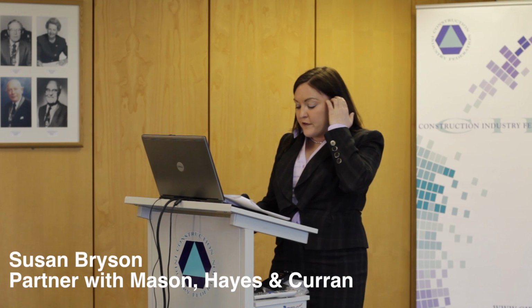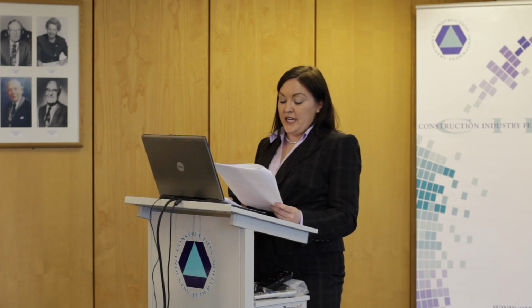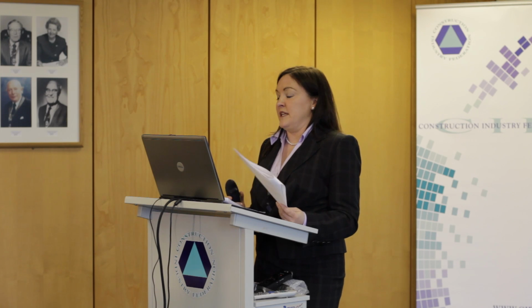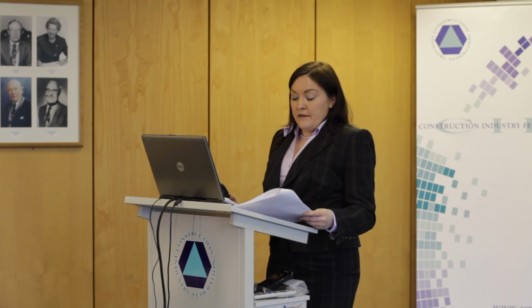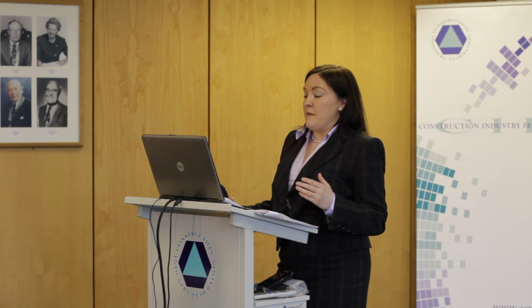Clause 3.4 provides that until the EOR issues the defect certificate, so any time before defect certificate, if the EOR gives the contractor a written instruction in relation to the works, the contractor must implement the instruction. This can include an instruction changing the works or an instruction imposing or changing restrictions on how the works are to be constructed. Now that's very, very common, as you all know.